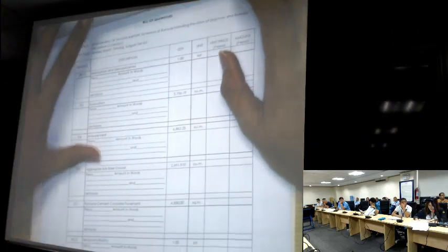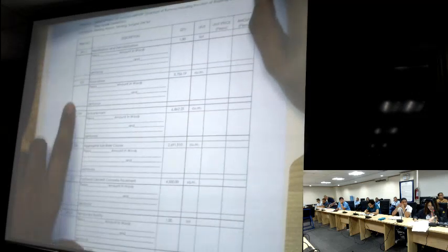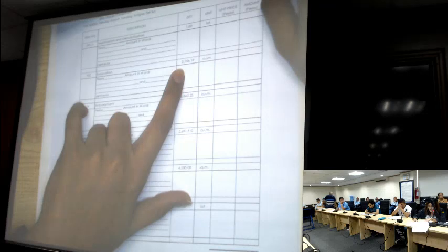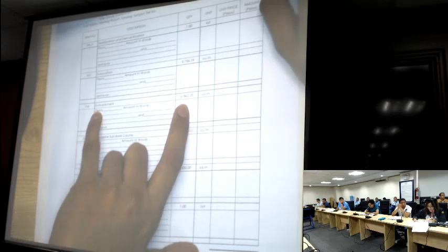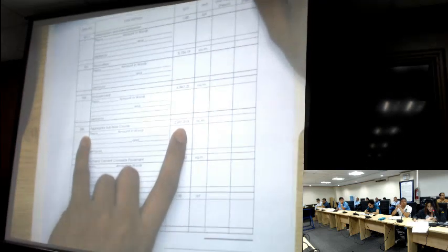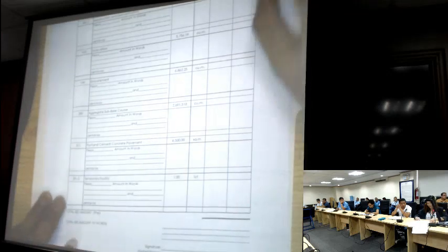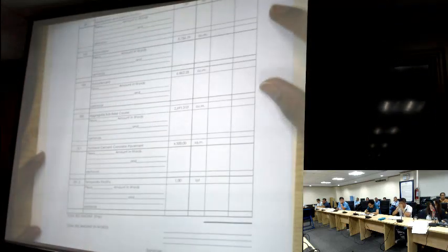Shown is the bill of quantities for this project. We have item number SPL 1 mobilization and demobilization, item 102 excavation. For excavation, we have 5,756.90 cubic meter. Item 104 for embankment, 6,862.35 cubic meter. For aggregate subbase course, 2,691.51 square meter. For BCCP, 4,500 square meter, and temporary facilities. Sir, the end user would like to recommend this project for posting.